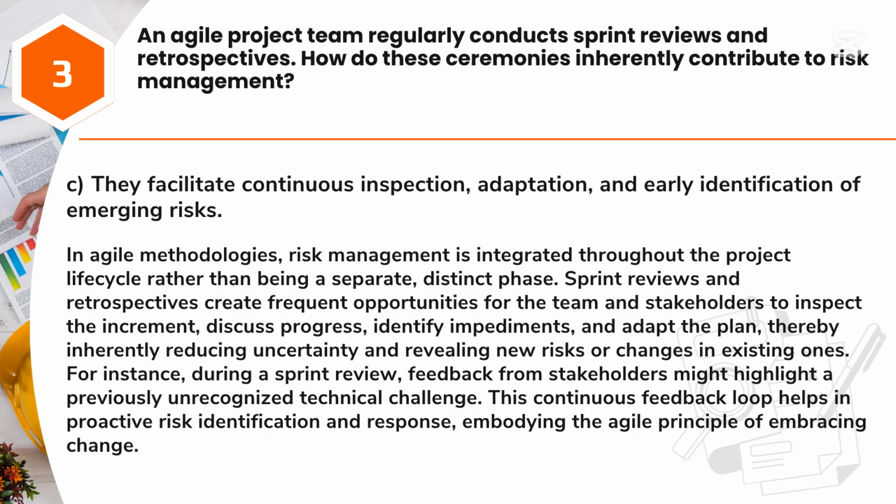For instance, during a sprint review, feedback from stakeholders might highlight a previously unrecognized technical challenge. This continuous feedback loop helps in proactive risk identification and response, embodying the Agile principle of embracing change.